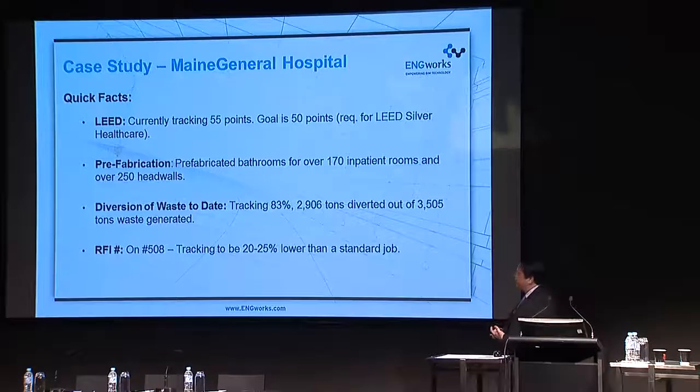I think the prefabrication, we talked a lot about it, and Steve said how much fabrication's done in the United States. This was very interesting. Obviously, these patient rooms, these head walls were completely done, completely assembled and tested and sent to the field. As much detail as the furniture maker was getting templates to cut out the electrical holes, everything. So it was pretty amazing. And by the due date and how quick it is, you can see it worked.